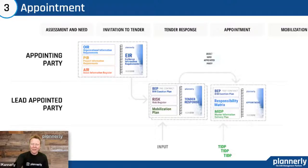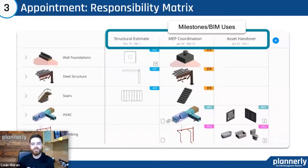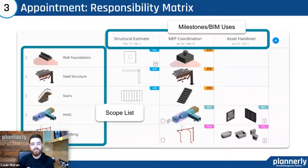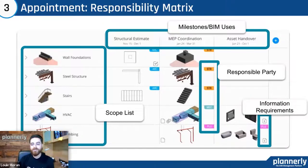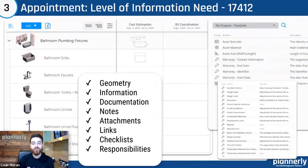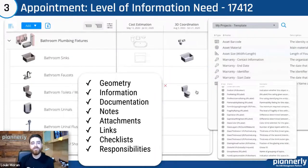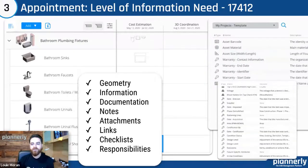Keeping all of that together is very important. And then when we look at the appointment workflow, we're selecting a lead appointed party and they will start to include responsibility. All of this is set up inside of the scope with the responsibility matrix, the task information, and the master information delivery plans. Teams can visually understand the milestones or BIM uses within this module. They'll be able to put the list of what items are required — whether elements or documents — to accomplish those specific goals, what information is required and who's responsible. Also the level of information need — being able to specify how much effort is needed and what specific information.